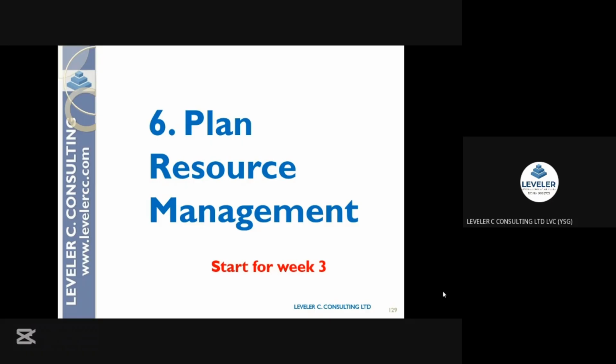and ensure that they are able to come up with what we call a resource calendar. That resource calendar tells you when resources are going to be available. Let's say, for example, in our organization, Zainab is an accountant, and we can ask Zainab to work on project A, project B, project C. So what that means is that Zainab is supposed to be on all of the 3 projects. So if I need Zainab to be in my project, I need to be sure of where Zainab is on project A and project B.